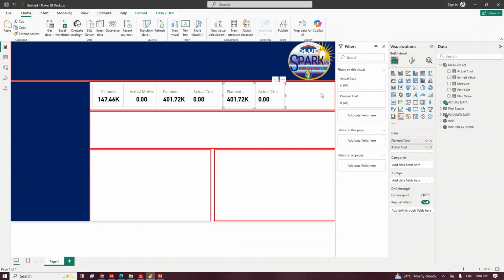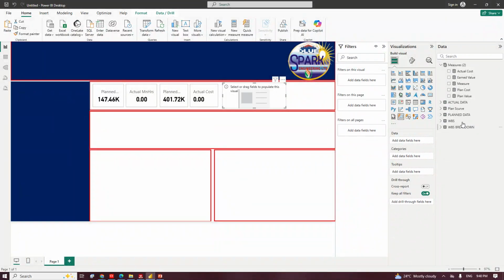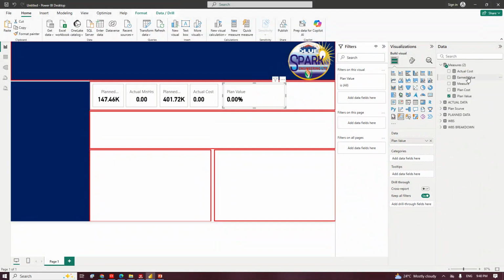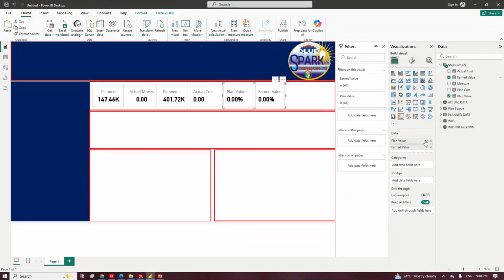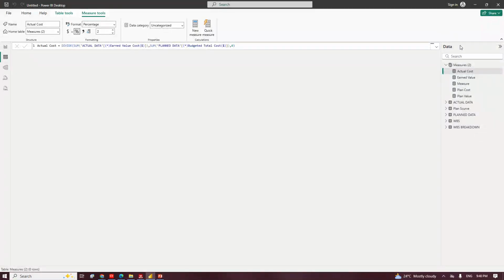And let me use this one. Let me assume 3 will enter here. So I will remove this, remove this. Okay, so I will now go to my plan value and put my M value. Sorry, we need to do one more. So my plan value is 0, I have not progressed. M value is also 0, I have not achieved anything. I will do one more, which is my variance. So my variance is just my plan value minus my M value, right?